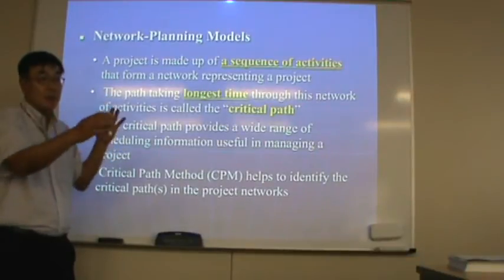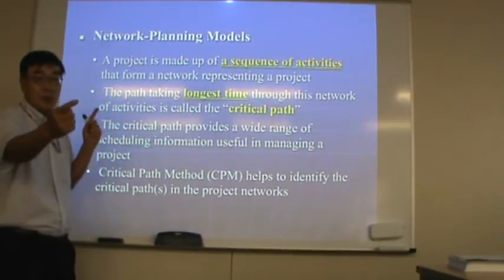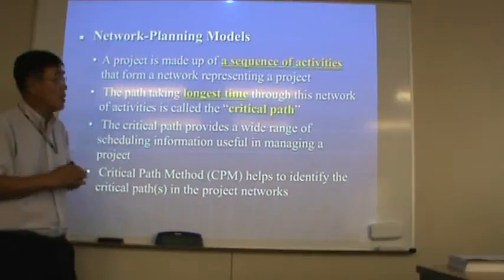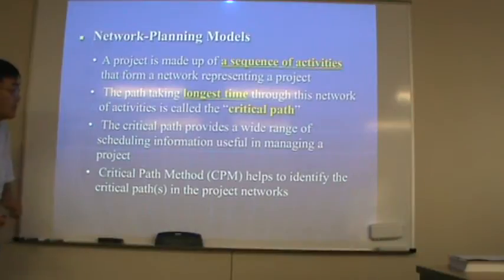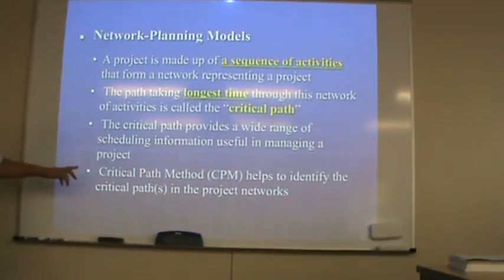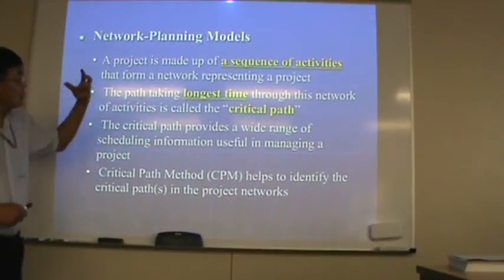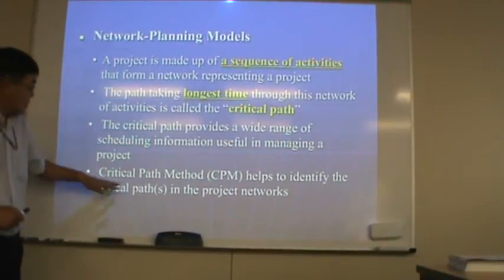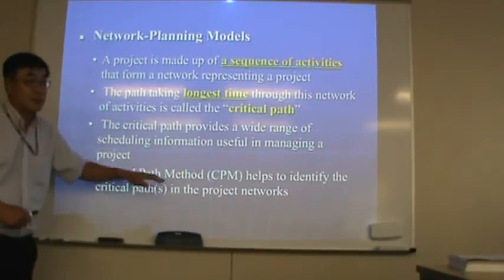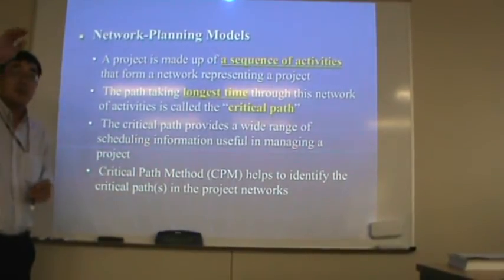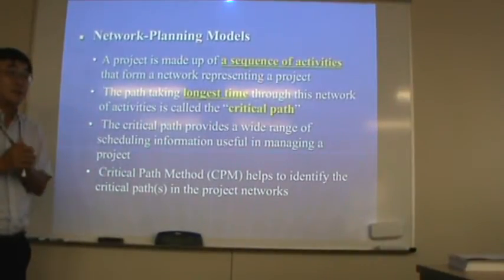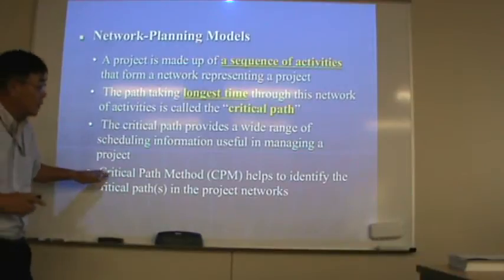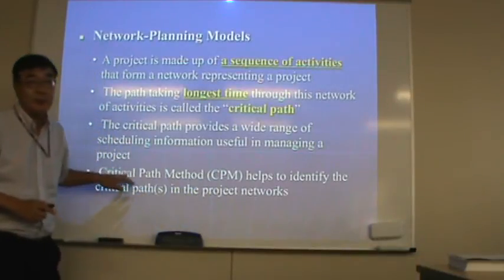Then in a network, there are paths. I will tell you later again. The longest path is the critical path. And we also call these network planning models the critical path method, because a certain path is critical. So manage that path first.